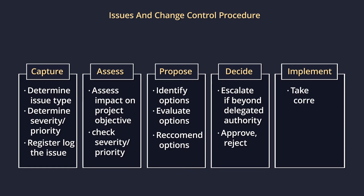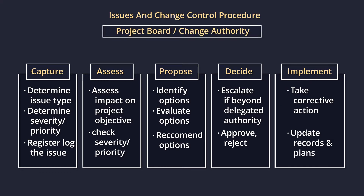During the assess step, undertake impact analysis. The analysis should include the impact of the issues on the project performance targets, the project business case, the project risk profile, and any other dependent products produced by the project. Impact analysis must cover three areas: business, user and supplier. The issue register and issue report should be updated on a regular basis.